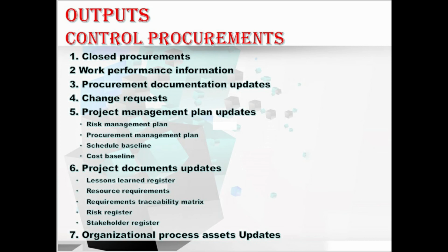Moving to the risk register. In this, each approved seller comes with its own unique set of risks, depending on the seller organization, or the duration of the contract, or the external environment, or the project delivery method, or the type of contracting vehicle chosen, or the final agreed upon price. So all this new information is updated in the risk register.